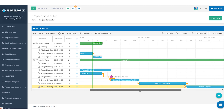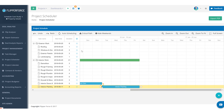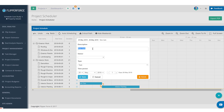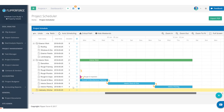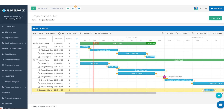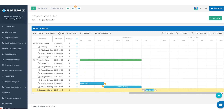After interior painting, we can also start working on our bathroom and kitchen finishes. With kitchens and bathrooms, materials sometimes take a while to purchase and deliver — if you're doing a custom kitchen it'll take the cabinetry supplier a while to manufacture and deliver the cabinets. Let's add cabinetry — kitchen cabinets and vanities. If we're installing all kitchen cabinets and vanities, let's make that a full week — five days of work for cabinetry and vanities on the property.